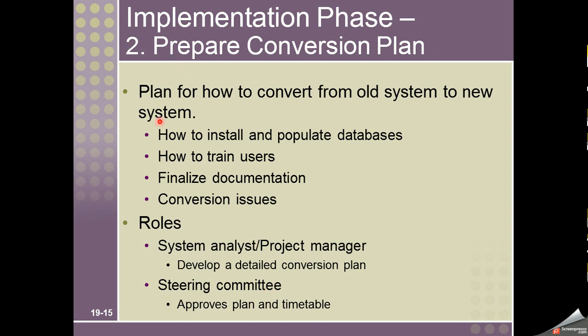Now, prepare a conversion plan. We plan for how to convert from the old to the new system. Mostly it is a challenging task. We have an old system and we want to convert it to a new system. There are many things that we need to take care of, like how to install and populate the database. Taking the data from the old to the new database is a challenging task. How to train the users? We need to train the users. We need to finalize the documentation, all the user manuals, help manuals, the documentation of the system and so forth. And we have different conversion issues and different ways of converting to the new system.